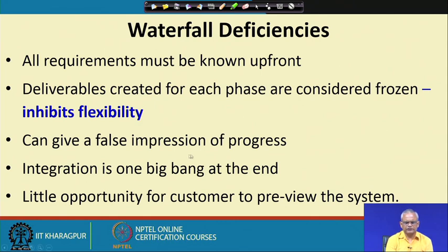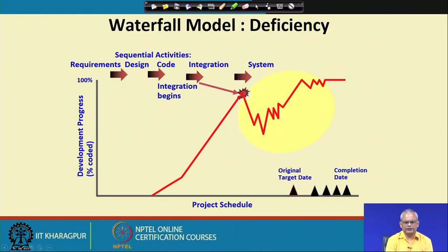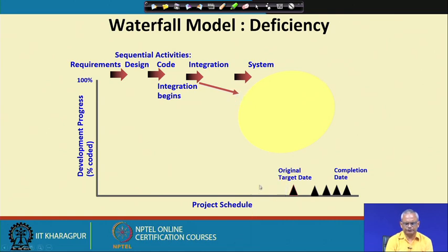It can give a false impression of progress, because we find that requirements are complete, design complete, coding complete, but then during integration problems may occur.